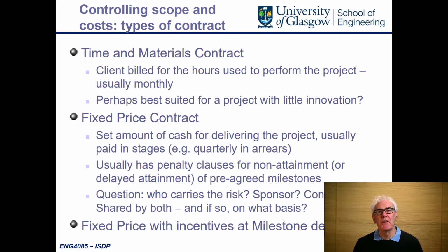Well, you're not really billing the client for projects, but you need to record how much time and resource you're applying to each part of the project. If you've got a piece of software to write and you've estimated it will take 3 weeks, when the project manager comes along at the end of 2.5 weeks and says, "Are you finished?" you'll probably say, "Nearly." Over 40 years in industry, I've learned to interpret an engineer saying nearly means they're about 60% through. So it suggests that the project will take longer.